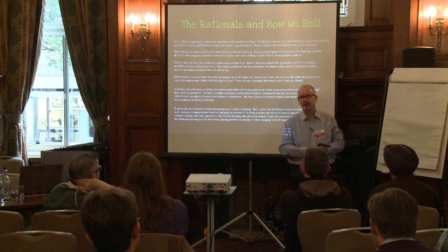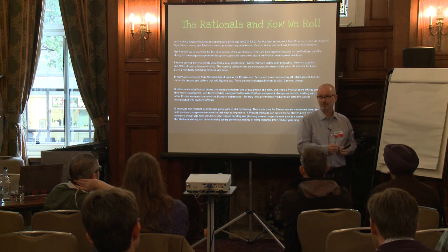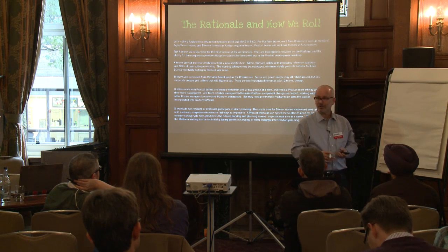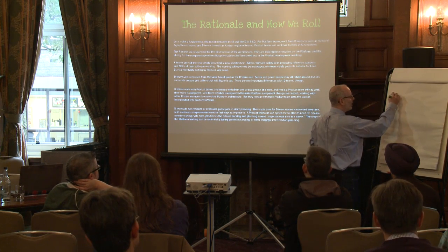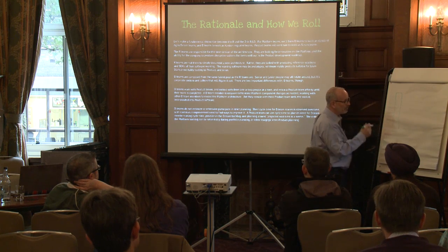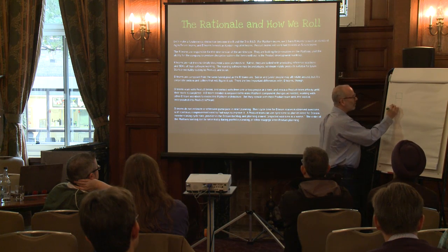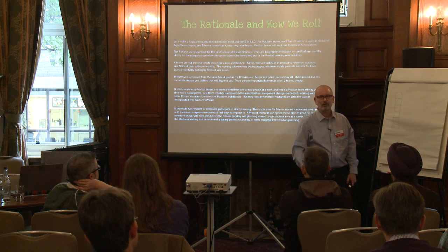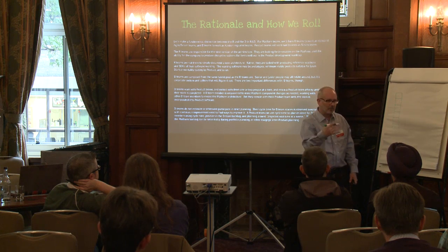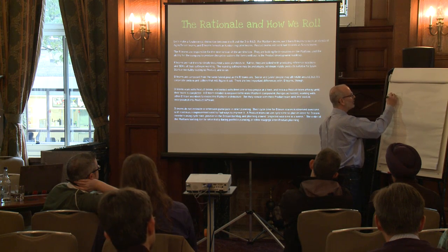Ties back to things. If you're doing internal work, you probably have a planning season annually, something like that, where everybody goes back and says, how are we going to spend our money as an organization? Here's the products that are out there. Here's the projects or products that we have to produce. When I work with organizations on the strategic end of the solutioning, you need to come out with a single ranked order backlog of initiatives. Okay. Traditionally, it's done annually. I'd prefer that we revisit that stuff in a rolling fashion, so we do it quarterly.